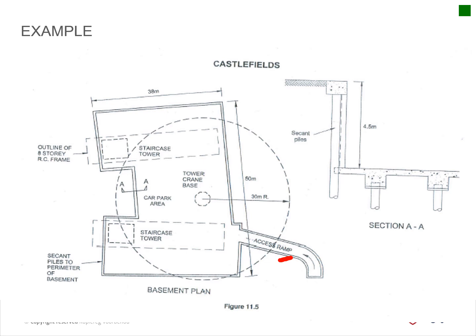And then there will be pedestrian access via scaffolding access towers. The volume of the excavation material is approximately 9,800 cubic meters, and the program duration for the works is 4 weeks or 20 days. Okay, so then they can calculate how many trucks they need coming in. You will see on page 250 where they actually do the calculation of machine output. There are 25 loads per day that they have to take out.